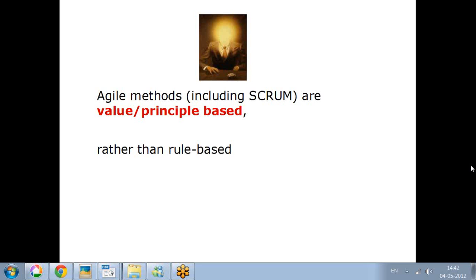So if the customer wants to develop 100 features, you estimate for that, and you tell them that if the scope changes further, there will be a change request and they pay extra. That's how fixed price works even in the waterfall model. So there is no difference there. I presume that in waterfall fixed price projects, when the scope changes, you are not giving it free.